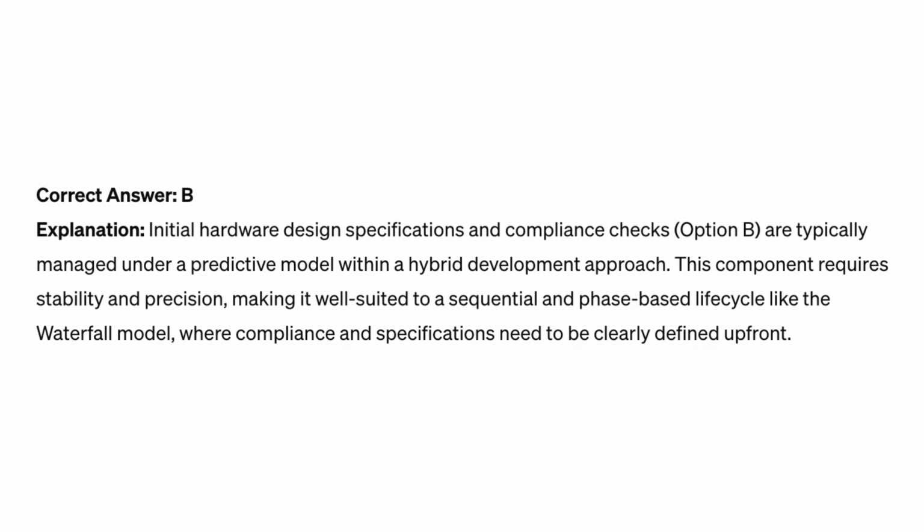Correct answer B. Explanation: initial hardware design specifications and compliance checks, option B, are typically managed under a predictive model within a hybrid development approach. This component requires stability and precision, making it well suited to a sequential and phase-based lifecycle like the waterfall model, where compliance and specifications need to be clearly defined upfront.